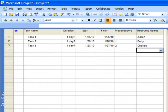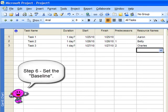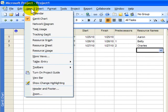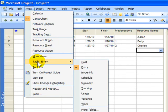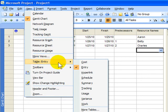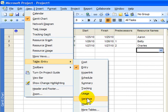Now once you've assigned the resources, then you want to save your baseline. What is this baseline business? If I change to look at a different table on this Gantt chart, instead of looking at the one that's titled Entry, I'll choose the one that's named Variance. The Variance table will show a project manager the difference between what he or she had originally planned and the actual start and finish dates once the work begins.